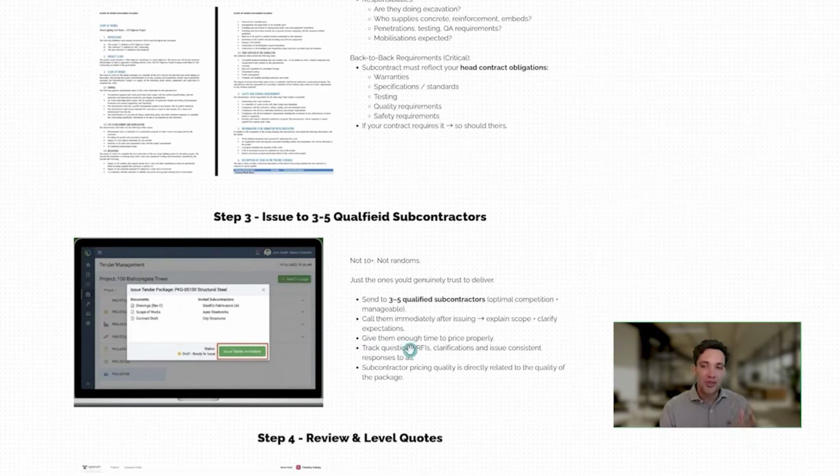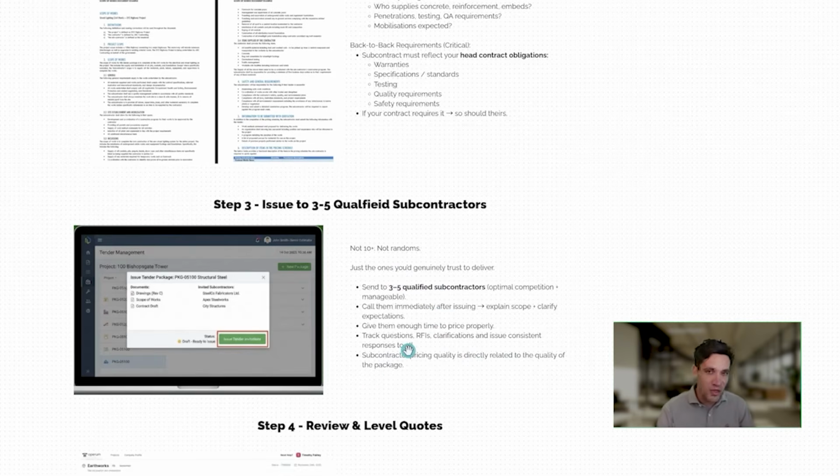So unfortunately, construction is a competitive environment. Your clients will get 3 quotes to check your price against, so you should also have numerous qualified subcontractors that you trust, that you're happy to work with. You should be getting 3 to 5 quotes for every single package. Now, the goal here isn't just to send it out to any 3 to 5 random subcontractors.